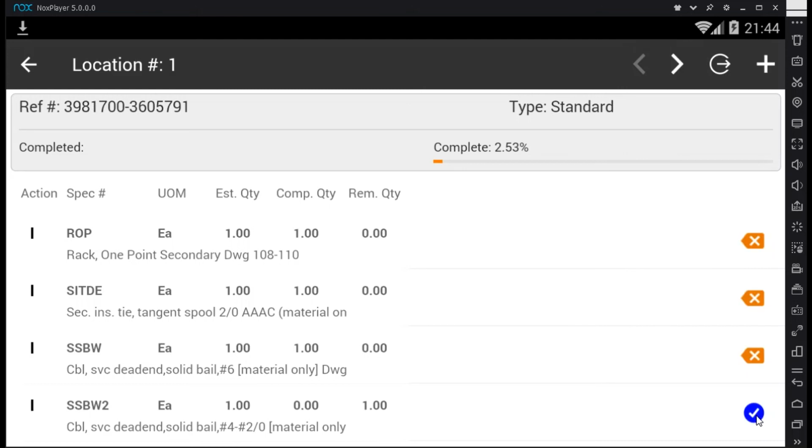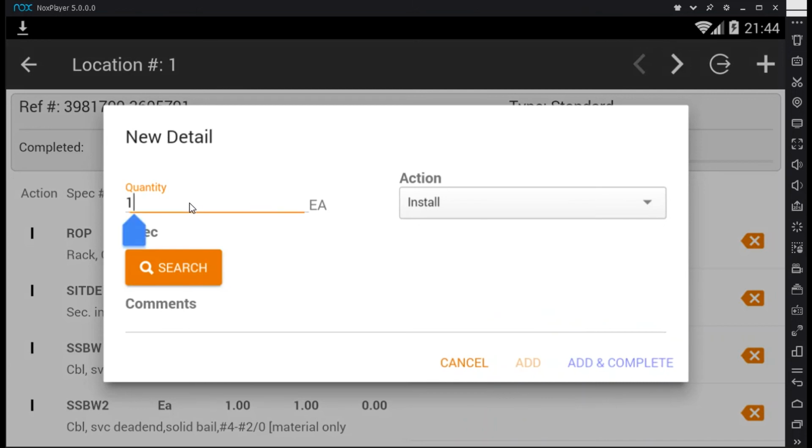And the foreman is going to go ahead and add a unit. So we'll hit the plus here. He believes that he's due 4 hours of wait time because the inspector told him to wait on the inspector before he did anything today. And the inspector was an hour late getting there, 4-man crew, 4 hours of wait.